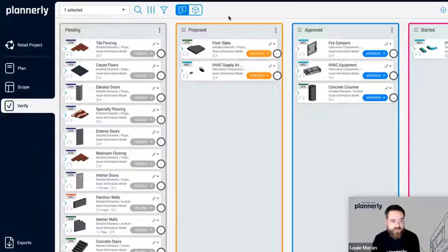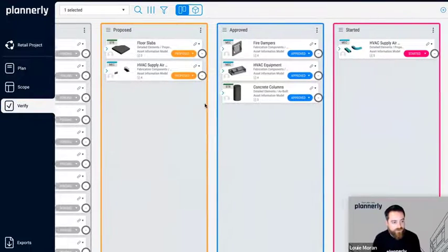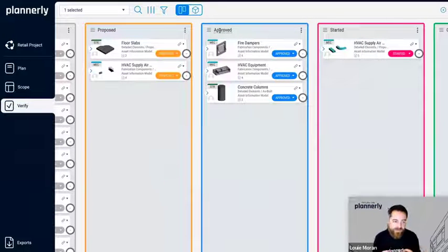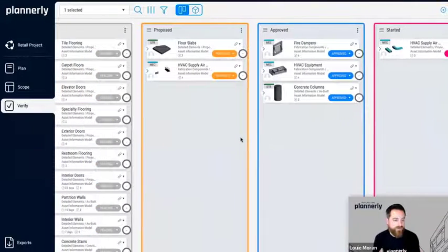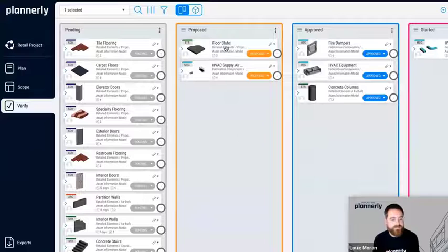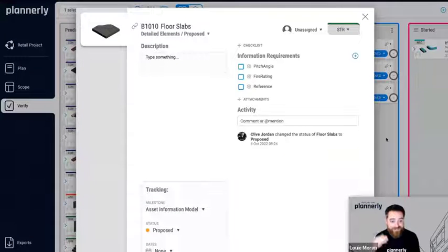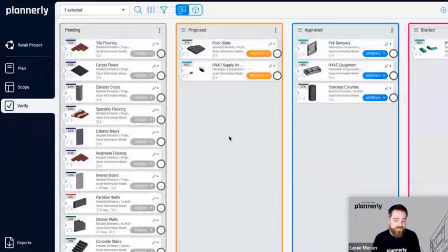Yeah, you create your own custom workflow. Whether you're trying to approve scope in the very beginning stages of a project, you can have this approval workflow of what's proposed, what's approved. They can use the Kanban board to make updates or make them live in the scope. And then as those tasks progress, then you can have other statuses like it's been started, it's completed. Some of those are already added here because the scope and the Kanban, they're all integrated. Wherever you open up that task, you're looking at the live updates of each one. So you can always go back to the scope and actually get a full overview of where each task's status is.